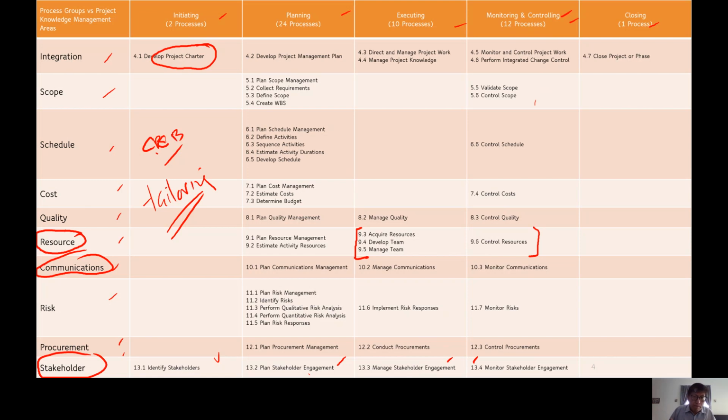What we have just discussed here is our stakeholder management. First, identify who they are and which category they belong to: resisting, neutral, facilitators, or supporting. Are they key decision makers, or are they just grassroots? Then determine what kind of strategy can move them to support the project. We want them to be championing our projects, to have more friends in our projects rather than people who are resisting.